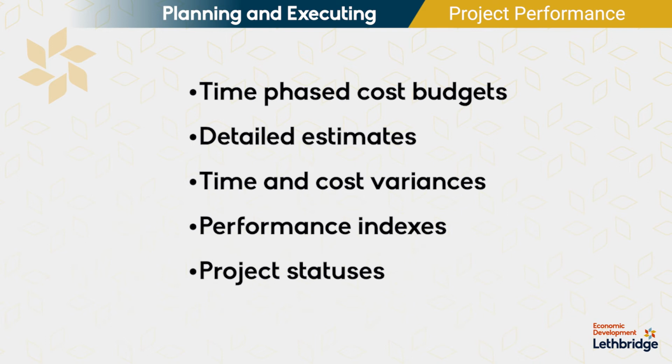It's kind of like a revised budget based on being partway through the project. Our estimate at completion is our actual costs plus our baseline budget less our earned value, and you take that and divide it by the product of our cost performance index and our schedule performance index. That'll give us our new estimate at completion.